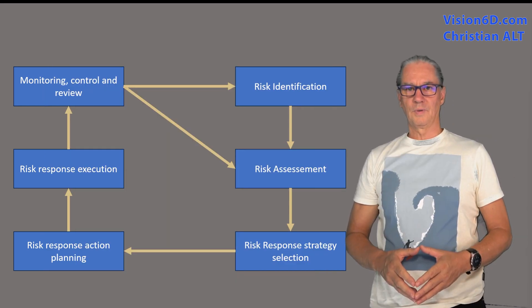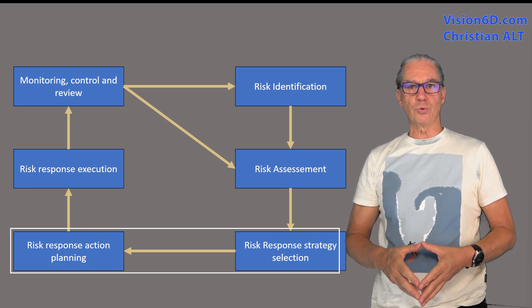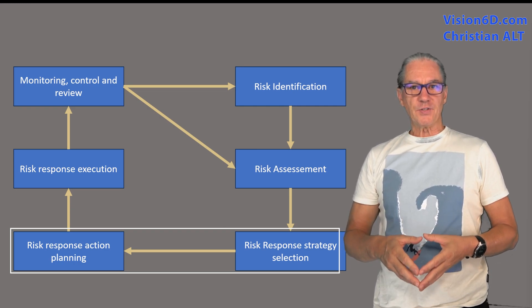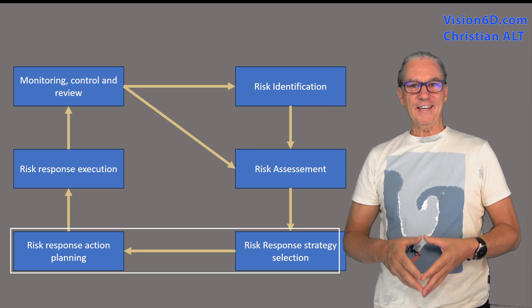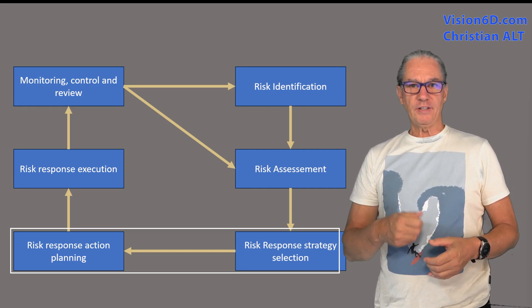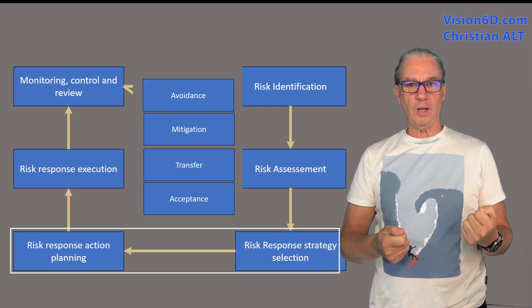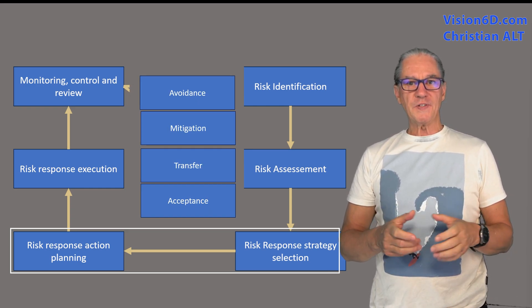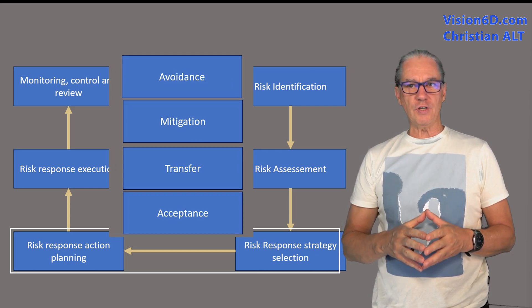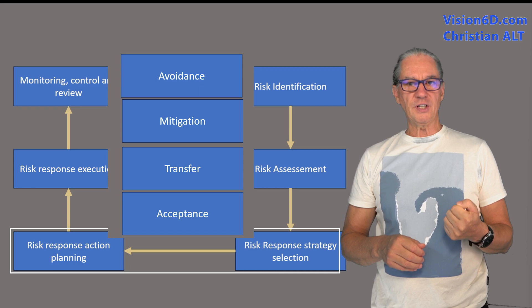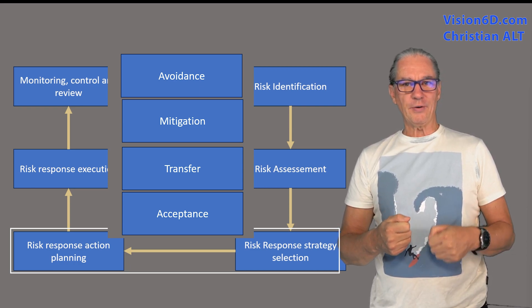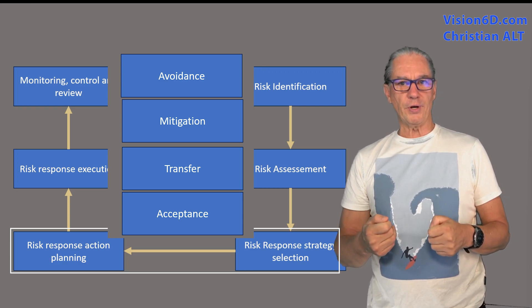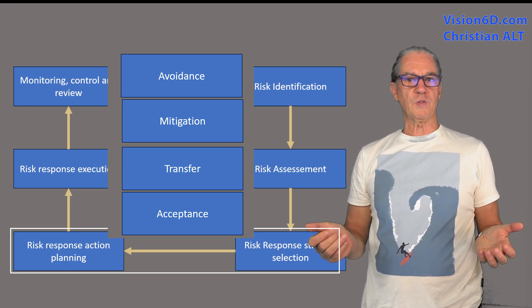The next step is to plan a response to the different risks. This response plan will address each identified risk and it will define specific actions as well as strategies. We will see that there are four different strategies. One is to mitigate. The second one is to avoid. There is a third one which is to transfer the risk and the last one is simply to accept the situation.